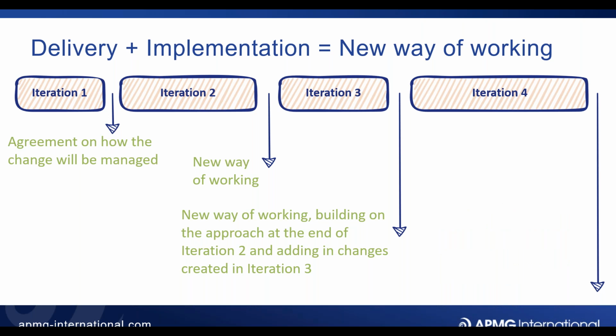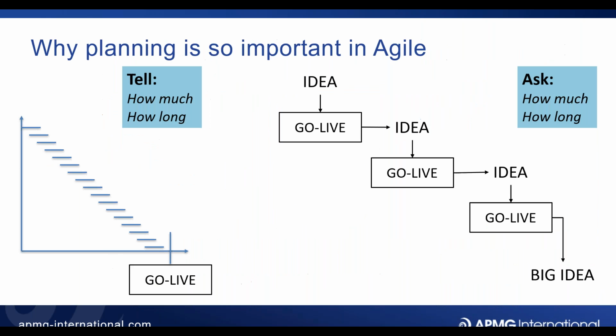Well, if I go back to the bottom-up planning on the left here, we didn't have to do that before. It was a whole different skill set, because we knew that we had one go live that we were heading towards, which was the full service. So I didn't have to keep making decisions about which bit of the service to go live with first. I only went live once, at the very end. So I had the freedom to come up with all of the activities and how they knitted together in the most logical flow possible.